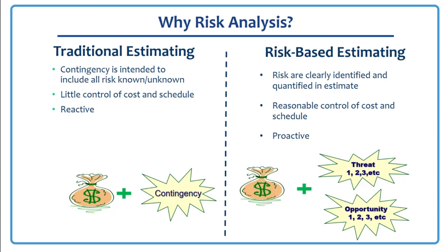This provides little control over the cost or schedule because we don't know the basis of the blanket contingency, and you're pushed into a reactive mode because you can only react when the risks occur. With risk-based estimating, these risks are clearly identified and quantified up front so that you will be able to have reasonable control over the cost and schedule, which makes it a more proactive approach.